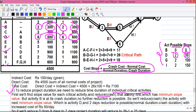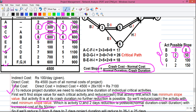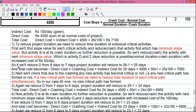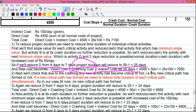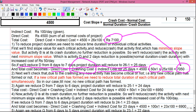We start with the activity having minimum slope value: activity B with slope 0, but since its possible reduction is also 0, it is already at crash duration. So we crash activity D next, which has the next minimum slope value of 50, with 2 days of reduction possible. We reduce activity D from 8 days to 7 days, reducing the project duration from 26 to 25 days. Total cost becomes: 4500 + 50×1 + 25×100 = 7050 rupees — a reduction of 50 rupees.